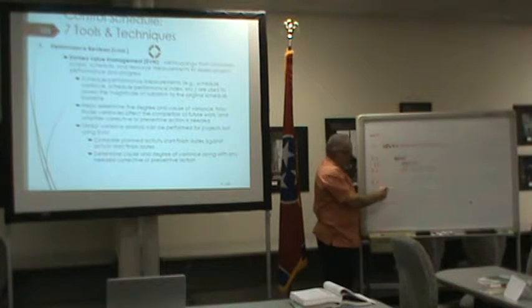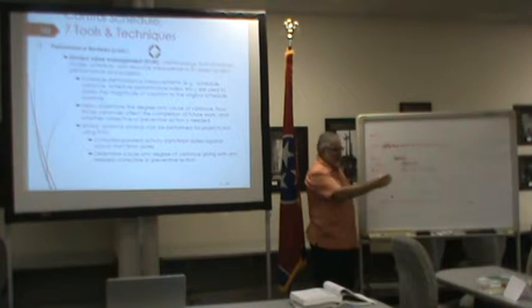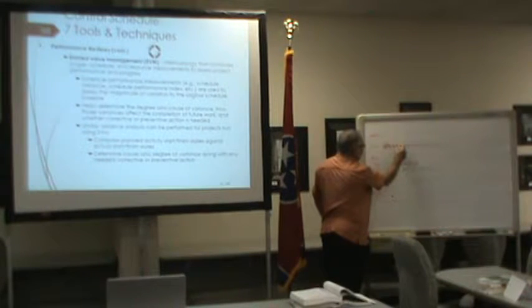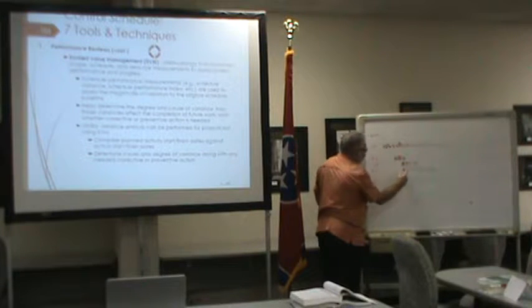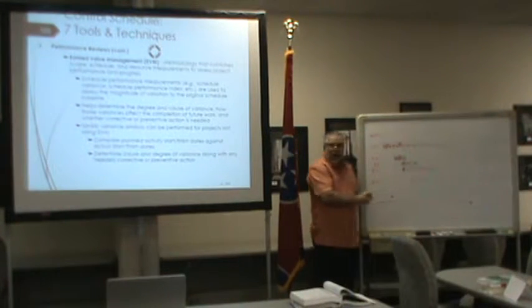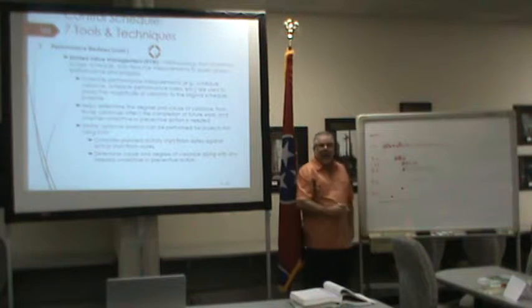So in this time period, the dollar value is just going to be that one task, right? That's you starting that project you were talking about. During this time period, I have this dollar plus those dollars plus a little bit here and a little bit there. If I could add all of those up, I would come up with a cost for that period, right? So that cost is going to be somewhere right here.